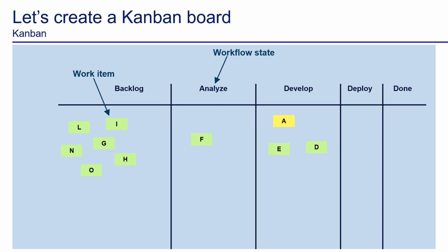To prevent too much work in the system, we can use a work in progress limit. We can, for example, start with the number of developers -1, so you force them to work together to move items to the workflow as quickly as possible, using, for instance, pair programming. Items in the workflow have the highest priority and need to be resolved first.